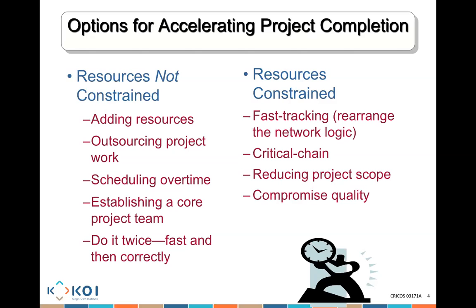You can decide to reduce the project scope. So instead of doing a lot of work, you might say, well, what if I do less work or fewer requirements, and then I still deliver to you within a certain period of time? Or the last thing, which is a pretty bad outcome, is to compromise on the quality. So let me give you work, but that work is actually not fully the work that you were expecting me to deliver.